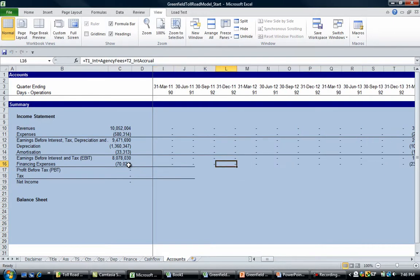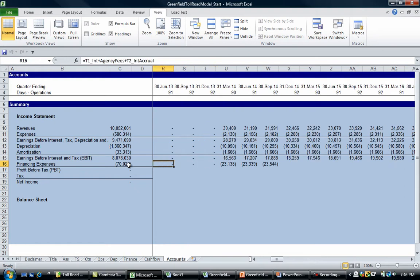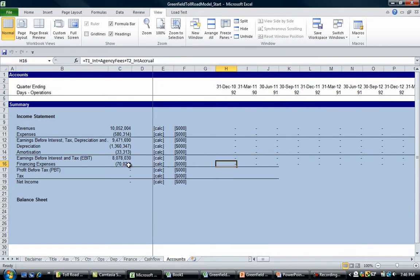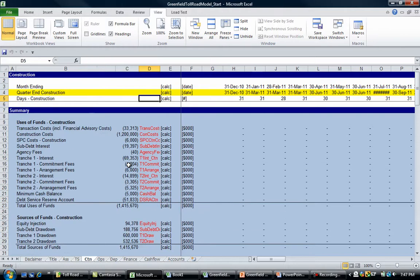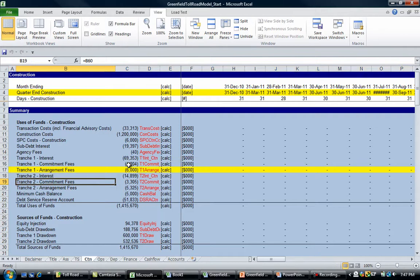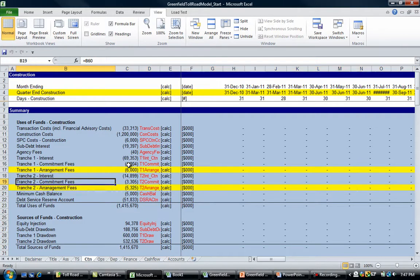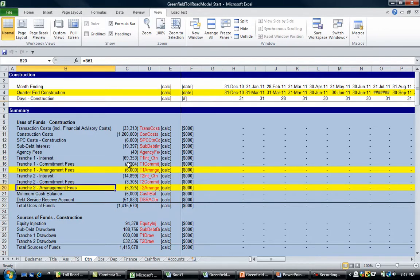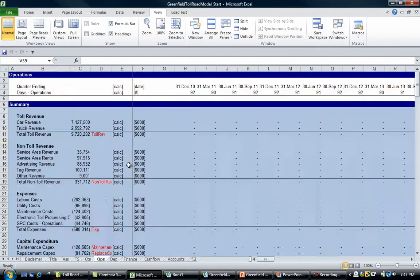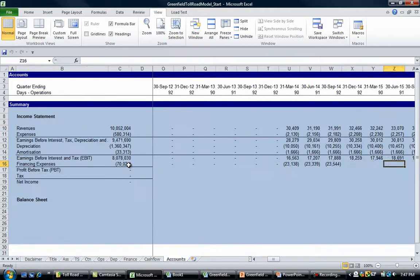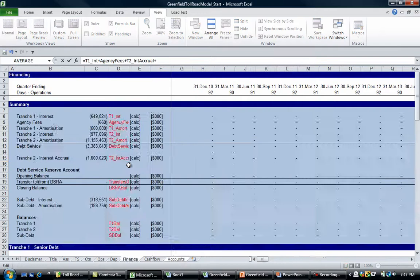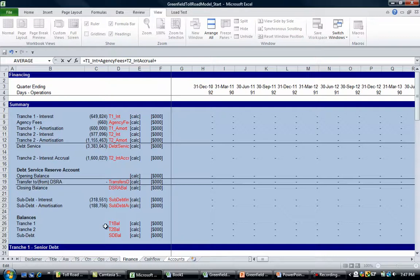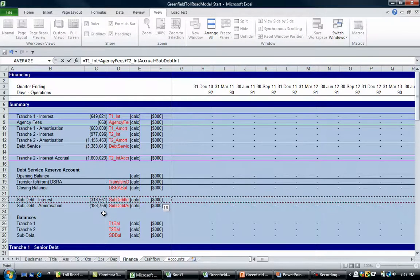Now we need to grab the financing costs during the construction period. Remember this is capitalized - the arrangement fee is capitalized, and the interest commitment fees on Tranche 1 and Tranche 2 and the sub debt interest is expensed. We need to add that in here as well. If we go back to finance or accounts and go plus finance, we need to add in our sub debt interest there.